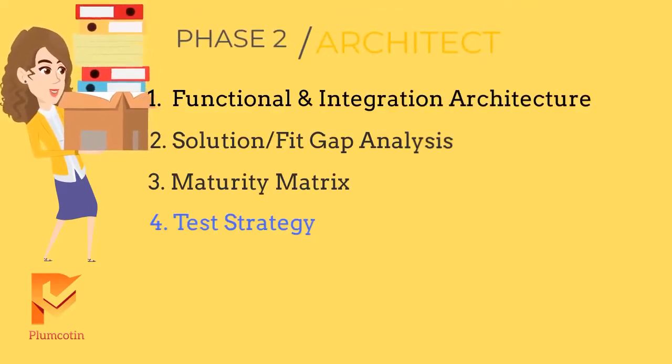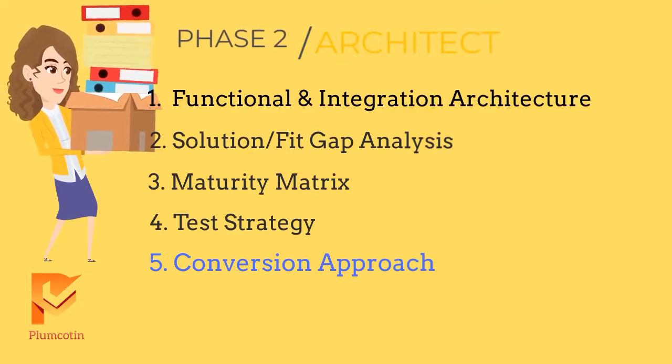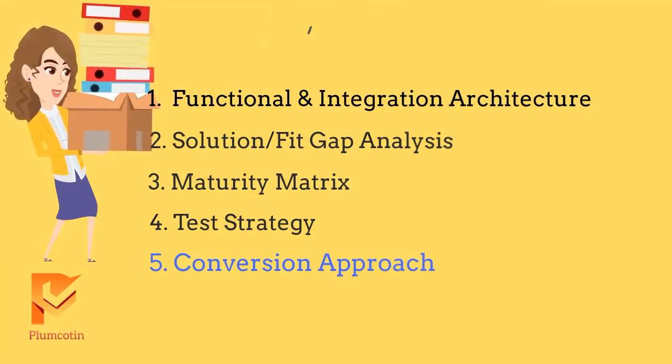Test strategy. Complete a test plan document that describes the purpose of each test cycle and the responsibilities of the key resources in each test cycle. Data conversion approach. The document details the data conversion strategy, approach, validation, and timeline.